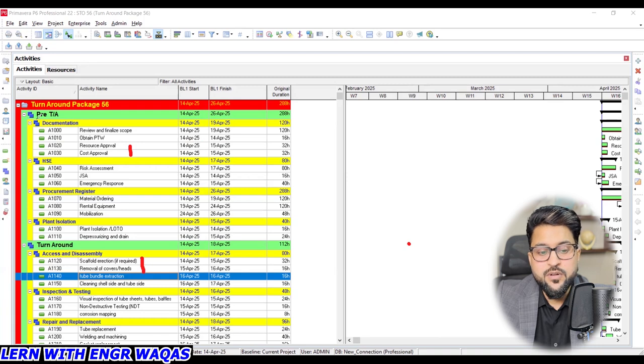Then there is internal dependency, like from inside of our company or plant, which factor is going to impact our project schedule. External dependency is a factor which is not part of our plant shutdown, but we depend on it, and it is outside of the company, like procurement, third parties, suppliers, vendors, regulatory authority, any standard which is going to impact our project or schedule management, right? So these are the four dependencies.